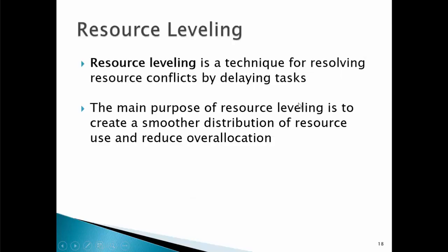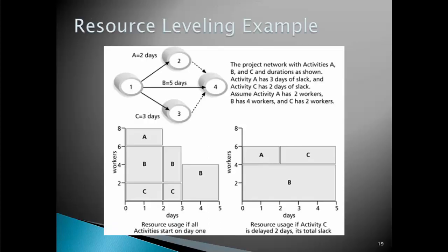To make sure that no resource is overallocated or underutilized, the project manager performs what's called resource leveling. Resource leveling is a technique for resolving resource conflict by delaying tasks. Resource leveling creates a smoother distribution of resource use. This diagram shows how resource leveling works.